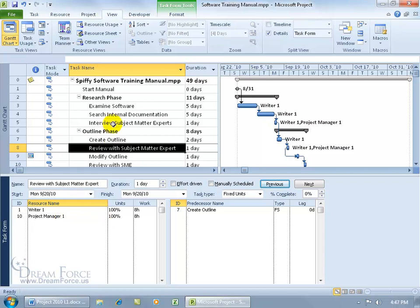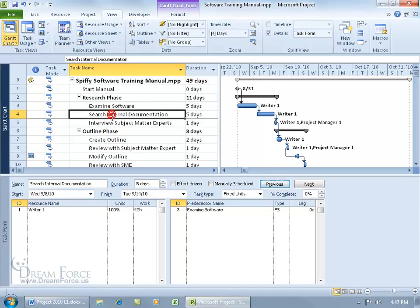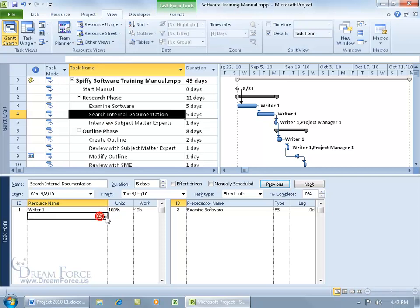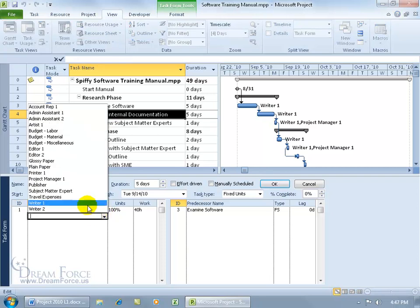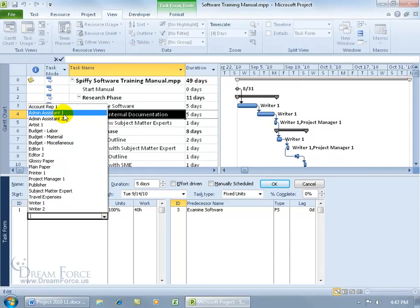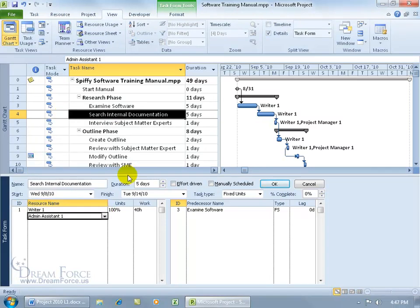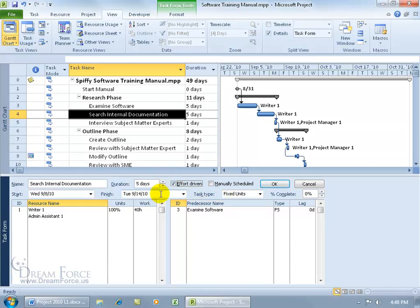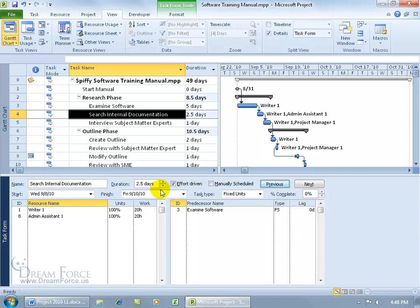Okay, let's do one more. Let's go to task 4 and add down below. Let's do admin assistant 1, effort driven, with fixed units. Okay, 5 days, 40 hours of work, it's going to split the work, 20 here, 20 there, click OK. Now it's two and a half days.